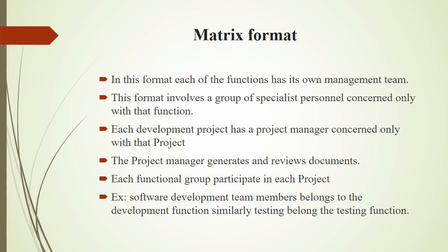Matrix format. In this format, each of the functions has its own management team. This format involves a group of specialist personnel concerned only with that function. Each development project has a project manager concerned only with that project. The project manager generates and reviews documents. Each functional group participates in each project.